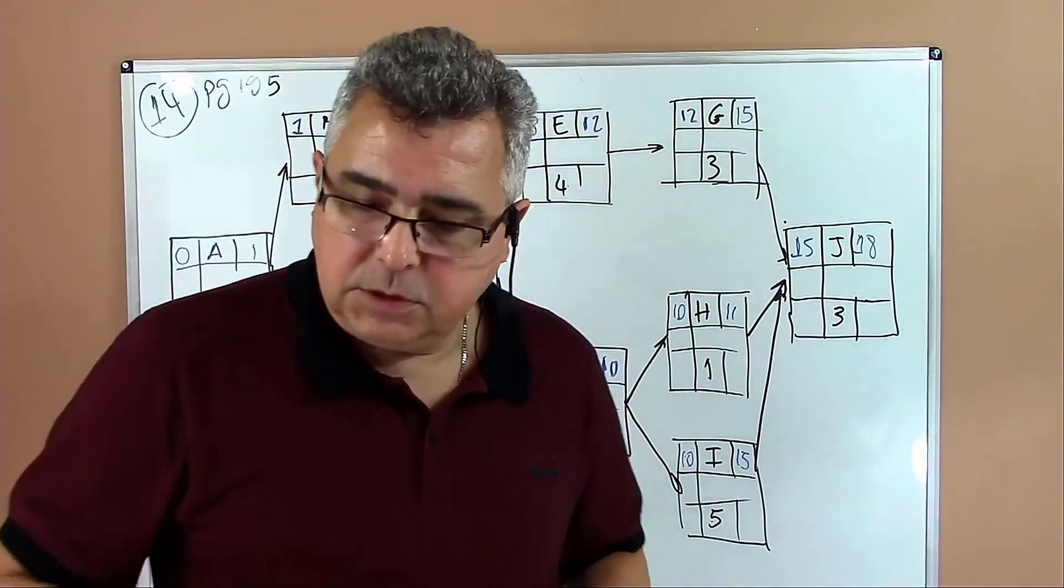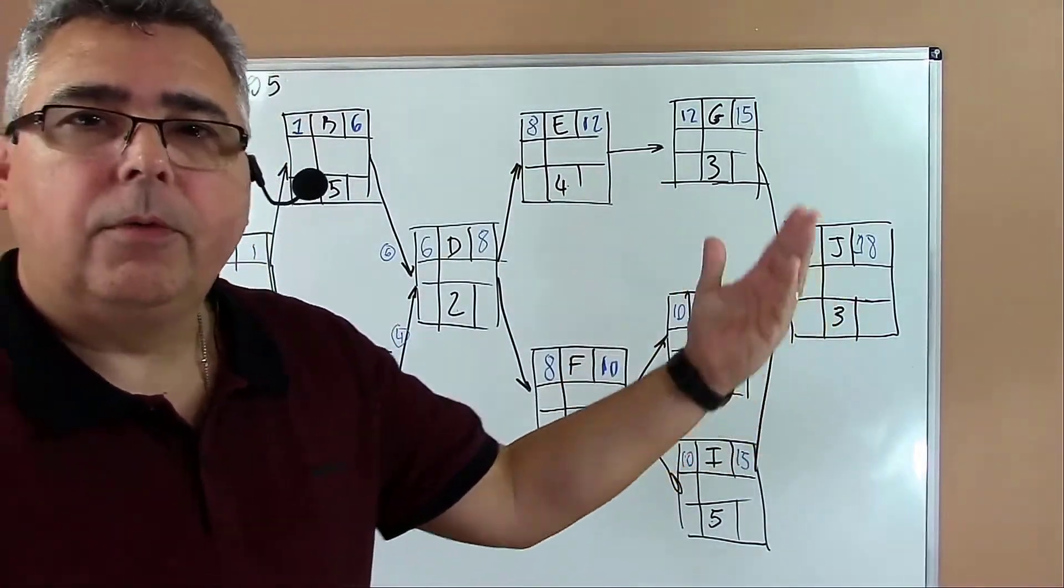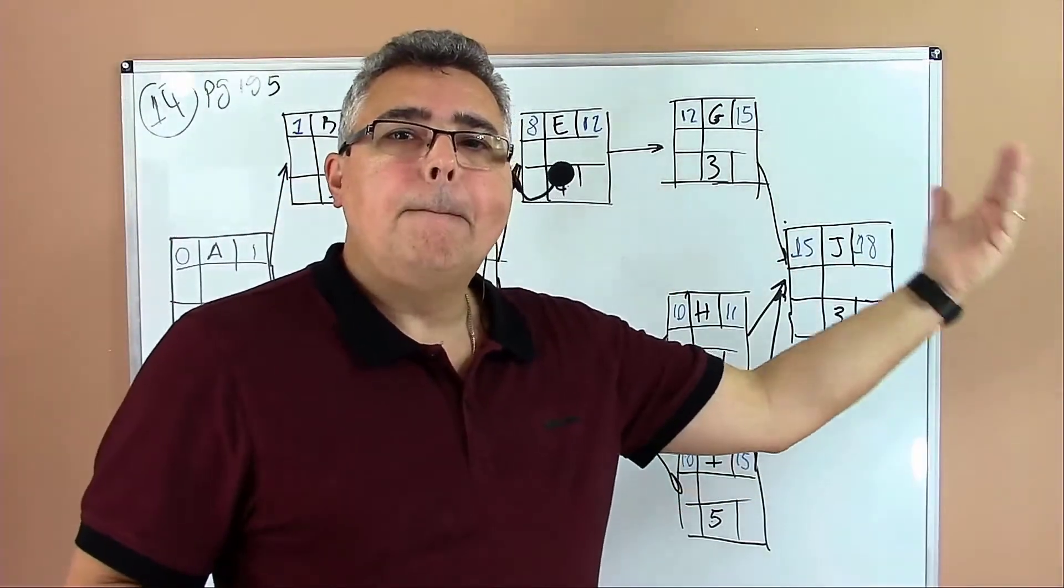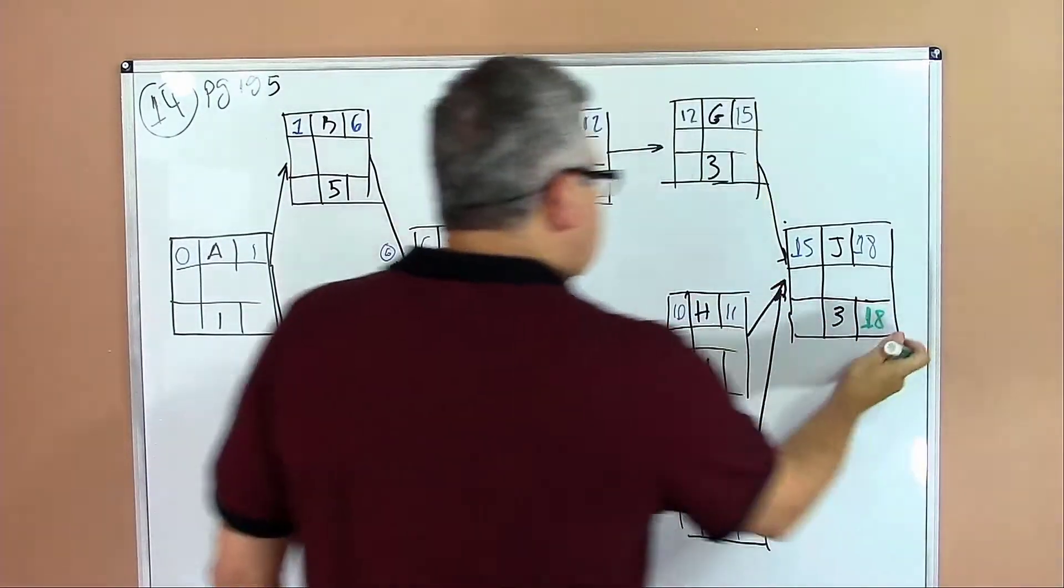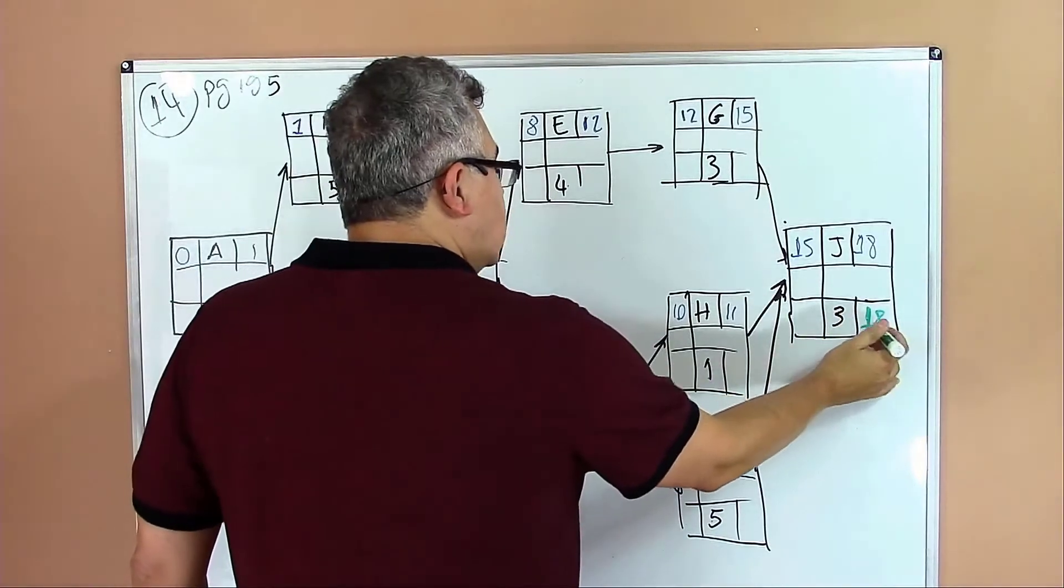Okay, that is the forward path. The forward path provides the project duration, the early start and early finish for each activity. Now let's move. Once you do the forward path, we can do the backward path.